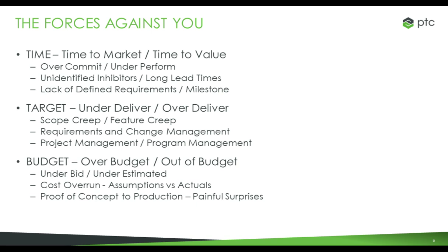We see this all the time, where the excitement is to execute the project based on a set of minimal requirements, thinking that you'll be able to expand on those requirements and gather them as you're going down. It's important to have milestones, and a lack of defined requirements typically is seen by missing milestones, not achieving your predefined milestones.